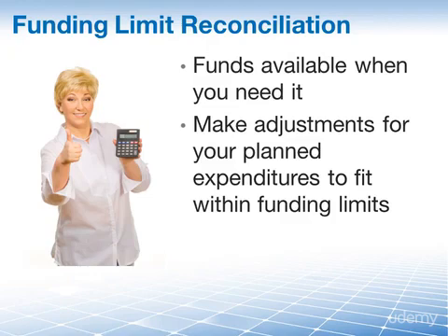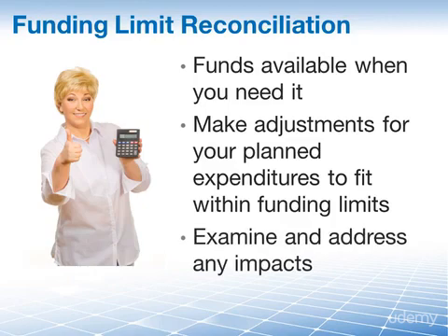For example, if your cost management plan specified that your spending curve should be fairly even and not fluctuate greatly from month to month, then in order to work within this constraint, you may have to reschedule work to more evenly spread out the expenditures. But as a project manager, before making any change, you need to examine and address any impacts of the change. For example, you need to look at your resource calendar and check for resource availability before you can reschedule any work.